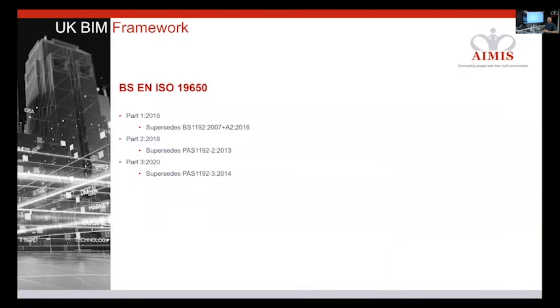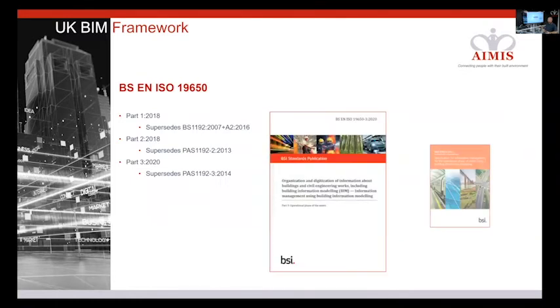Now, more recently, so those two were introduced 2 years ago, and I am still quite surprised that we are still seeing requirements from clients come through the door asking to comply with PAS 1192 Part 2, which just shows a bit of a misunderstanding. For 2 years now, it's actually been a withdrawn document.